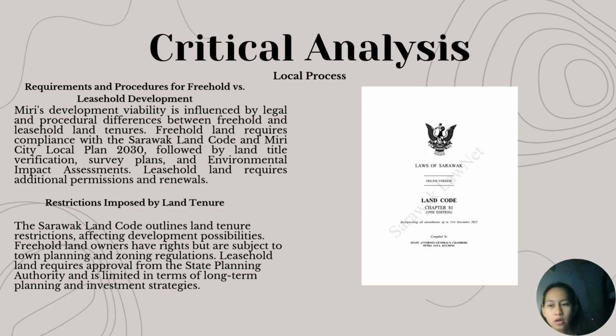For freehold land, developers must comply with the Sarawak Land Code and the Miri City Local Plan 2030. The process includes land title verification, survey plan, and conducting an environmental impact assessment to ensure compliance with